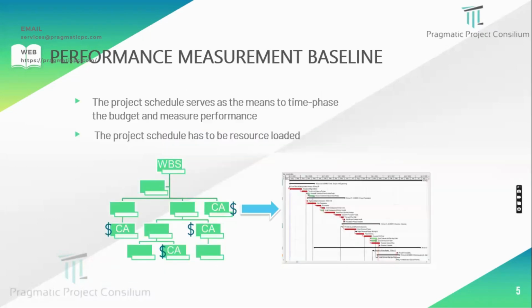Creating the various levels of WBS and keeping the WBS as a common ground, we further break down into the next level of detailed activity listing. Once it is all listed, it needs to be properly linked through relationships: finish to start, start to start, start to finish, and finish to finish. Those types of relationships we are going to introduce.